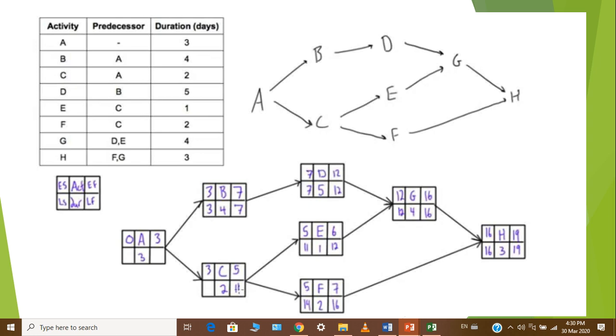So from E to F, because there are a multitude of predecessors, or successors in this case, both E and F will define the late finish and then the late start of C. I said I do it even for myself so I can remember: from left to right we're looking for the biggest or largest duration entering multiple dependencies, and from right to left, working backwards on our late start and late finish,